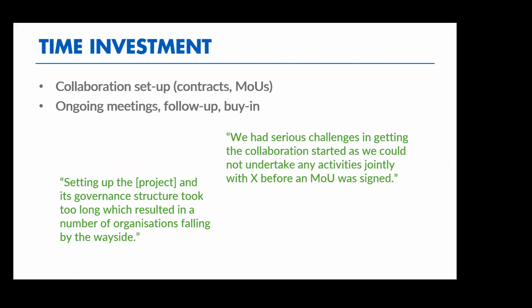Things like setting up collaborations, setting up contracts, setting up MOUs, those initial planning meetings, getting buy-in from partners, follow-up, agreeing on deliverables, that all takes a lot of time. It was mentioned again and again that that time was seen to be prohibitive. Also, especially in the initial stages, people underestimated the amount of time that it would take to set up the partnerships.